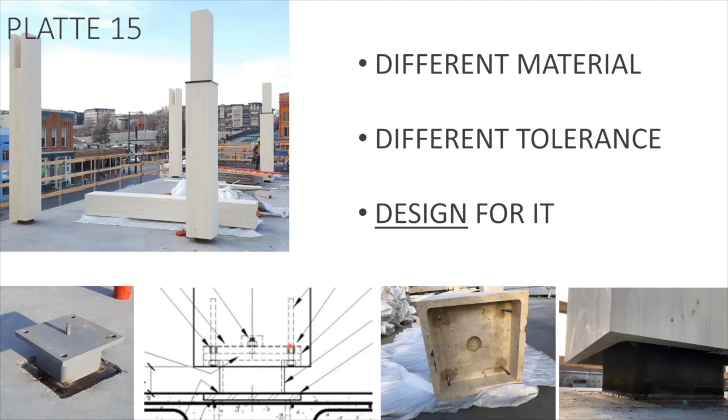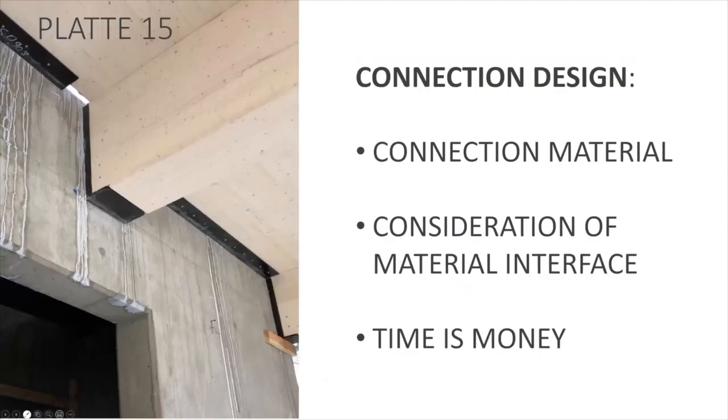And it really proved out so that when these columns showed up on the first day, the interface between concrete and timber is often a place where work stops, where there's a delay, where you lose the advantage of speed of construction. And those guys went up in the morning without a hitch. Really kind of a proud moment for us.